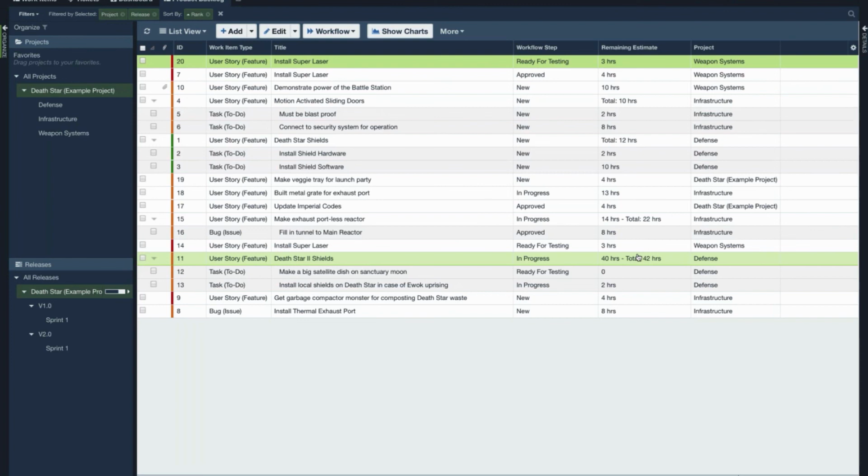If you use planning poker where you're using different numbers to validate the size of work, what's important is that you're agreeing on it as a team. So if I think something is an extra large and Jonathan thinks it's a large, well, we better have a discussion to figure that out. Otherwise, we're not on the same page, and maybe there's something that one of us is missing as to why he thinks it's a large and I think it's an extra large.